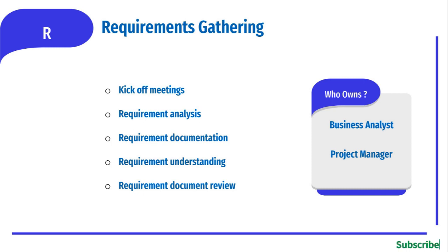These meetings will result in a requirements document that helps the business team from the music company to understand that all the discussed requirements are included, and the development team from the software company to understand the requirements and their feasibility with the current technology. The requirements document will go through review by both parties and will be frozen after mutual agreement on the content. This phase is owned by the business analyst and project manager.